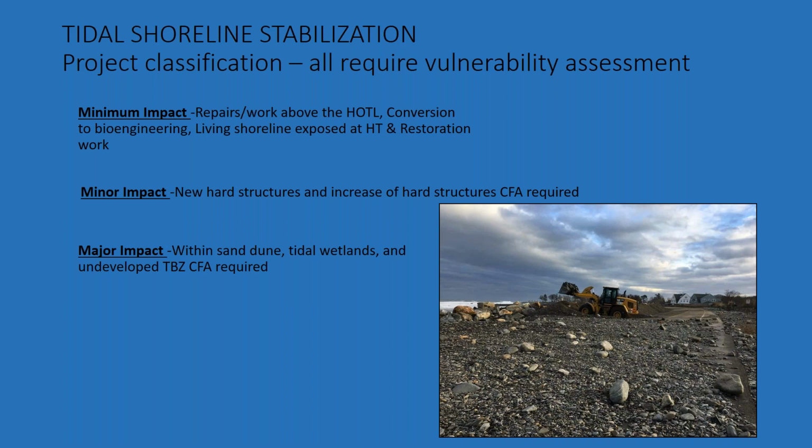This is where coastal functional assessment is required. And lastly is a major impact project. Those impacts within sand dunes, tidal wetlands, and undeveloped tidal buffer zone also require the coastal functional assessment.